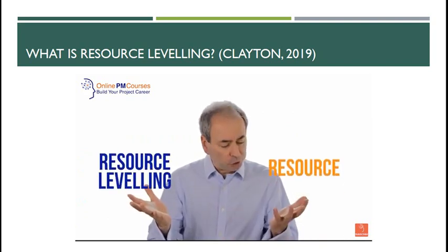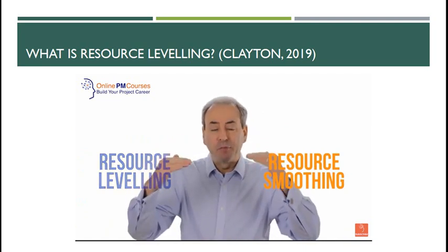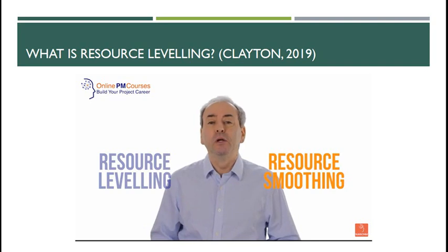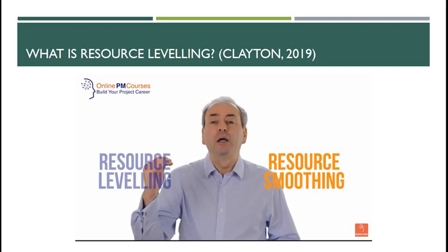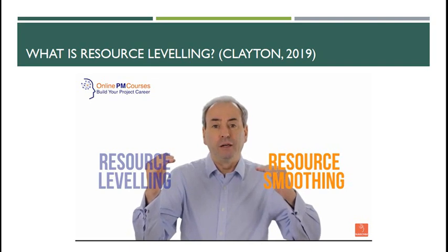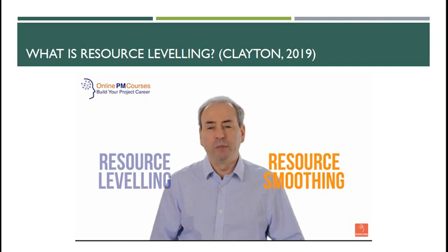So how does resource levelling differ from resource smoothing? Well, resource smoothing is more about balancing up the peaks and troughs in the demand for each individual resource. If you're asking me to do 20 hours of work in the next 3 days and then 4 hours of work in the following 2 days, then you can balance those out, and that's what we mean by resource smoothing.